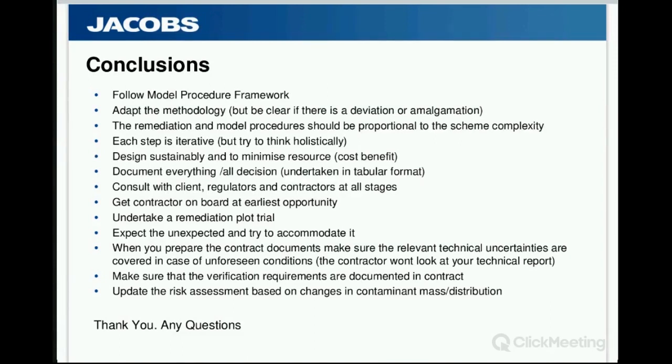But by taking your uncertainty analysis from all your previous assessments and getting them into contract, and this is absolutely essential, because the contractor will not look at the technical reports, drag all of those uncertainties into the contractual documents. It does feel a bit heavy sometimes, dragging all of these key points through all of these stages, but I can tell you now, the contractor will not look at your technical reports, and if you've highlighted a risk in there which doesn't get through to contract stage, you may as well not have bothered.